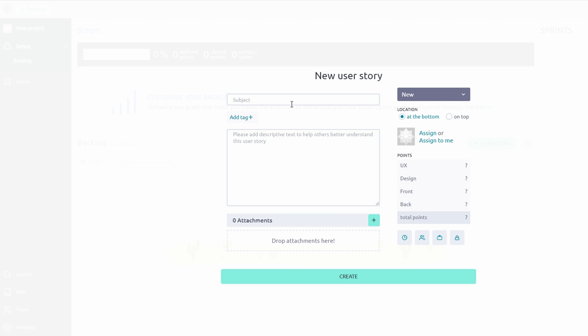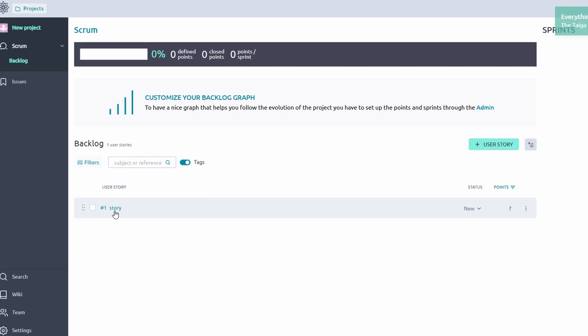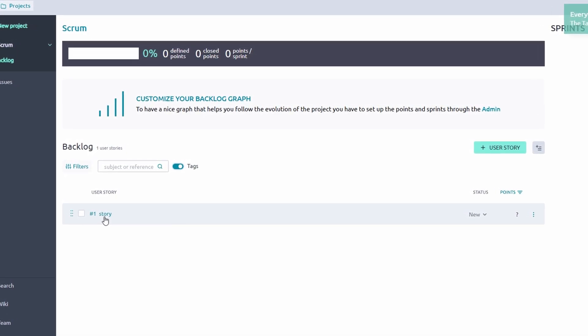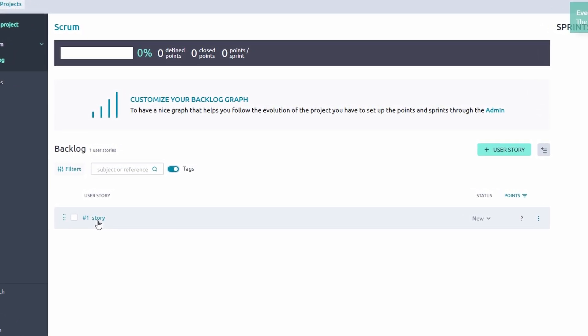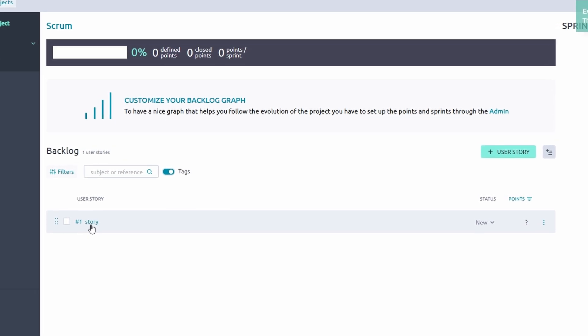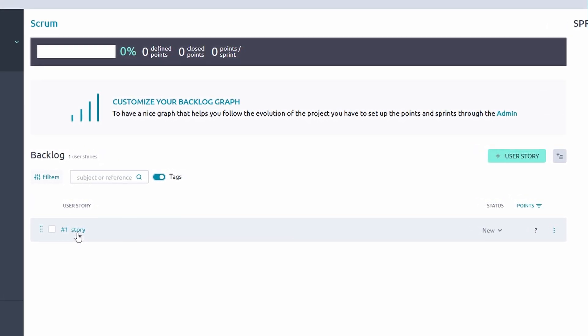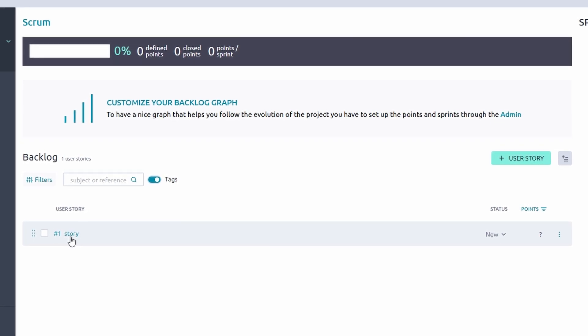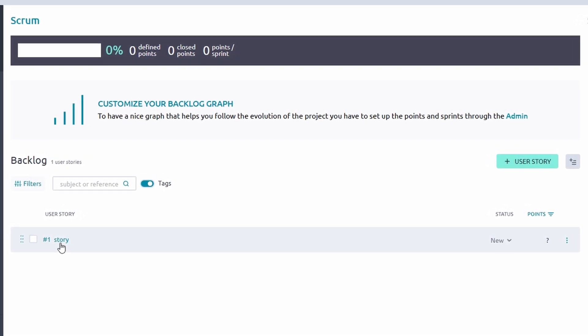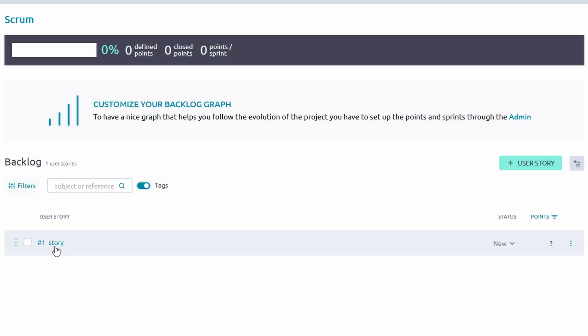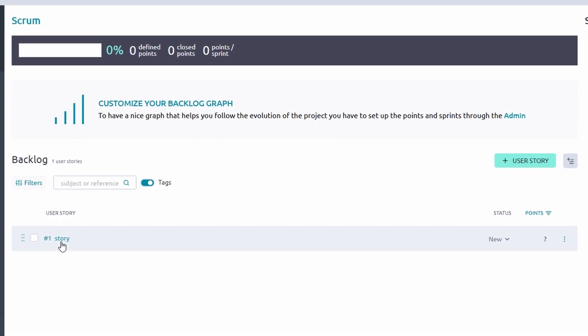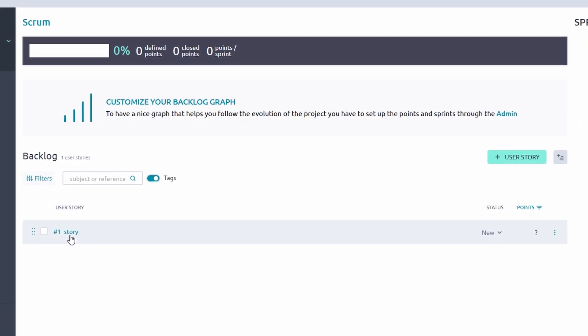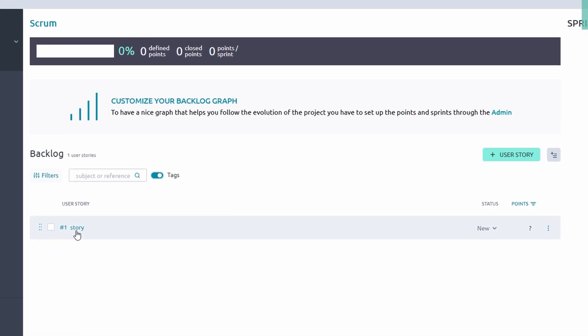Assign effort estimates to tasks, helping the team understand the workload and ensuring better resource allocation. For instance, a task like Code Payment Integration might get eight points, indicating higher effort. Prioritize tasks in the backlog before assigning them to a sprint. For example, organize tasks like Write Product Descriptions and Optimize SEO in order of importance to align with sprint goals.